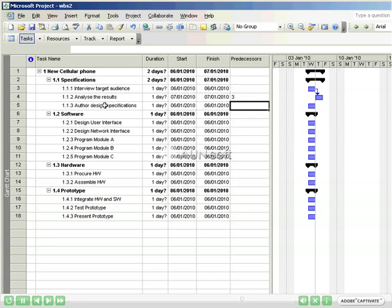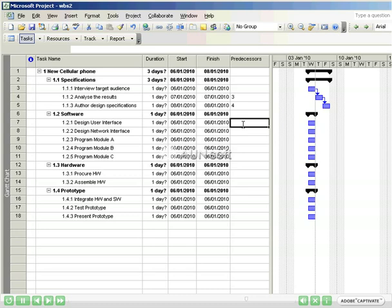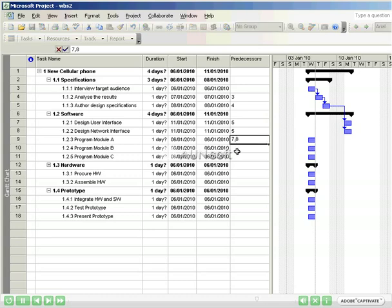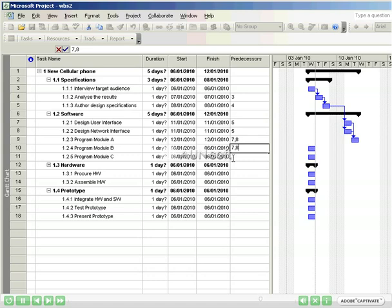In order to author the design specifications, we will have had to have analyzed the results. In order to have created the user interface design, we know that we have to have authored the design specifications. Same with the network interface. Now before we can do the programming for Module A, B, and C, we need to have both completed the user interface design and the network interface design. You can put two tasks, or as many tasks as you need, as predecessors in the predecessor column. In this case, both 7 and 8 need to be completed before I can start these tasks.